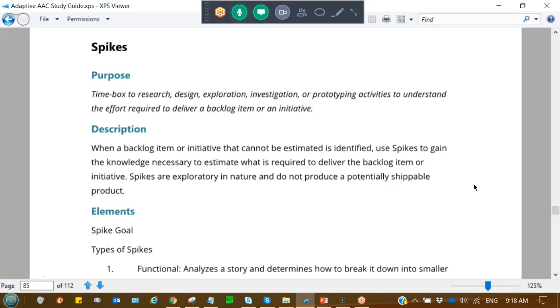If you find that you have a story that, as you start to work on it, is a little bit more complicated than you thought initially, if there's more scenarios that need to be worked on in order to fully deliver the feature, then you can take time to say, okay, we need to decompose this. You can take time to decompose things down into a better, more refined task list for doing the feature. That's what this is all about.